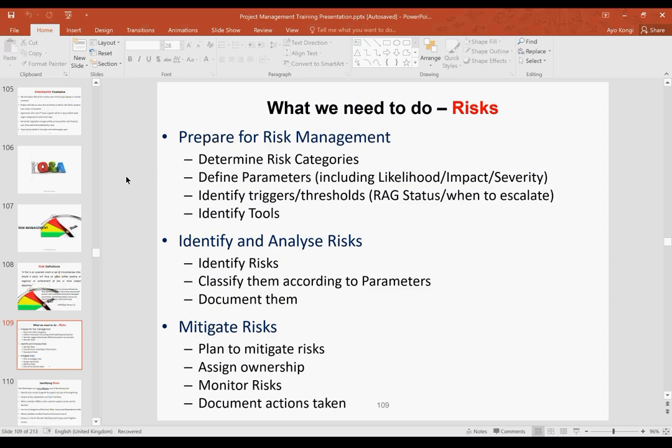In the past, what I have used on all the projects I've worked on is actually a brainstorming session, a workshop. Lock everyone inside the room. We need to start identifying risk. If we want to be successful in this project, we need to start identifying risk. And for us to identify risk, I want every one of you to get into a room. Let's start writing risks on our post-it notes and putting them on the wall. Once we put them on the wall, we can start fighting each other to say, no, that is not a risk, that is you forming things up. That can never be a risk, you understand? So after we've identified all the risks, we can now go into the analysis of those risks.